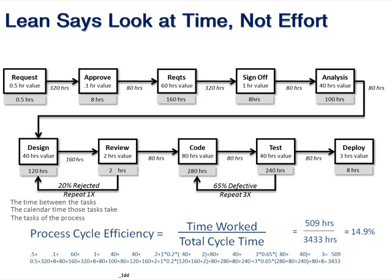That's what we mean by flow. So how do we improve flow while starting where we are? The first thing we need is some visibility into it. Here I've got what I call a simple value stream map that looks a bit like a waterfall. It's actually a flow chart where we're looking at time. You'll see we have request, approve, requirement, sign-off, analysis, design, review, code, test, deploy — those are the steps we're doing.